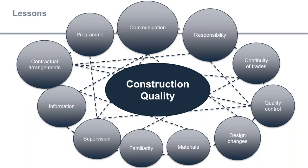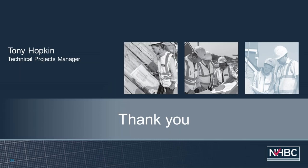In summary, quality assurance and picking up things like shown in the pictures, that's one part of achieving good quality. But some would argue that's a little bit too late. For me, feedback loops also need to be implemented to share knowledge, lessons, and improvement areas in order to stop defects recurring in future. If we identify any design defects, we need to feed those back. Any information gaps, we should feed those back. Any contractual arrangements that may have a negative effect on quality, feed those back. Any material changes, if a particular drawing specifies a material and what's available on site means you can't actually build to that, it should be fed back up the line to make sure it doesn't happen on future sites. But for me, most importantly, quality assurance and feedback should form part of a bigger strategy. Quality should be seen as part of the company culture and considered as important as volume and profit. So that's me done. Hopefully you could hear me towards the end.